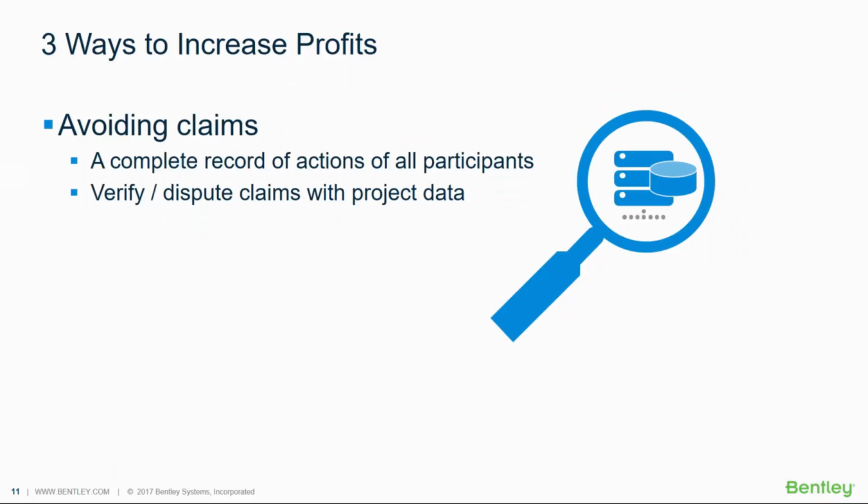On the same project that I mentioned earlier, GHD had a request from the contractor for a total of 202 days based on weather delays. Well, GHD was tracking the weather data automatically in the system, and they were able to negotiate the time extension to 107 days, cutting that in half just by leveraging the data that they had. And this was amicably accepted by both the contractor and the owner.